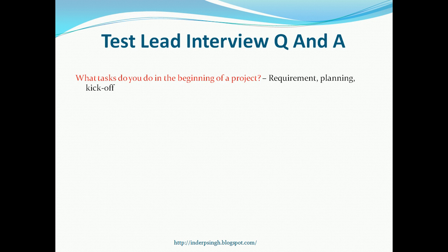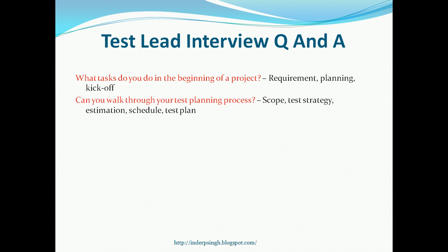What tasks do you do in the beginning of the project? In the beginning of the project, requirement review, planning, and kickoff are the tasks. Can you walk through your test planning process? So scoping the different kind of tests that are required based on requirements, coming up with an efficient test strategy, estimating the effort and the team size, scheduling all the tasks in line with the test strategy and the estimate, and describing the entire test approach in the test plan document.